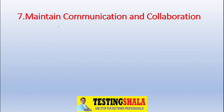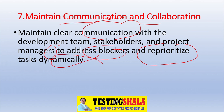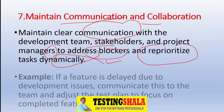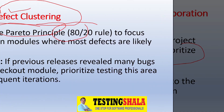The seventh important aspect is maintaining proper communication and collaboration with all stakeholders. To deliver a software testing project quickly, you need regular communication with stakeholders and the project manager to address blockers and redistribute tasks dynamically. For example, if a feature is delayed due to development issues, communicate this with the team and adjust the test plan — this helps manage delivery within a tight schedule.